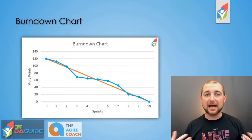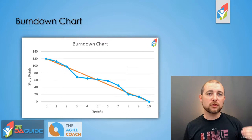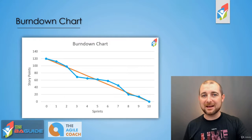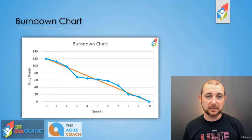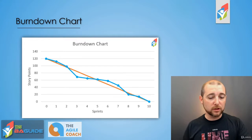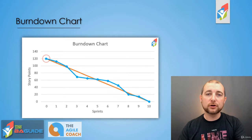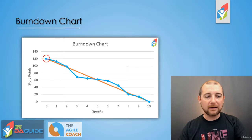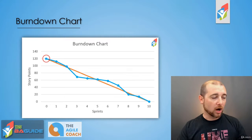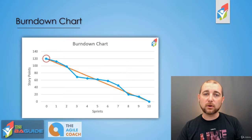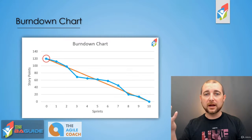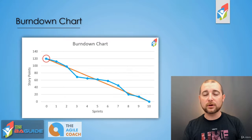The blue line is the actual — this is the work that's left remaining after each sprint is completed. As we look at sprint zero, we're at 120 story points. Obviously, we haven't done any work yet, so 120 points are part of the project and 120 story points still need to be completed.